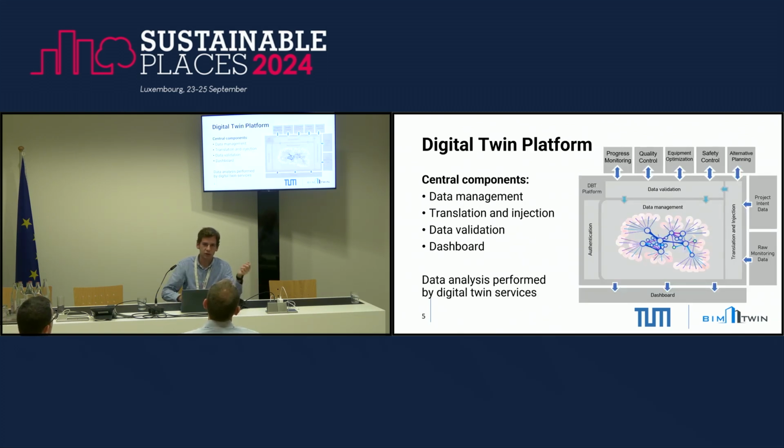So now coming more to the data management aspect, and more the focus of this workshop. The central piece here is the digital twin platform. In the center we have the data management module. This is based on a graph database, an RDF database to be more precise. On the right hand side, we have information that we need to translate and inject into this database, for example the IFC models, the schedules, and any type of planning information, but also all of the monitoring data that we've collected on the construction site.